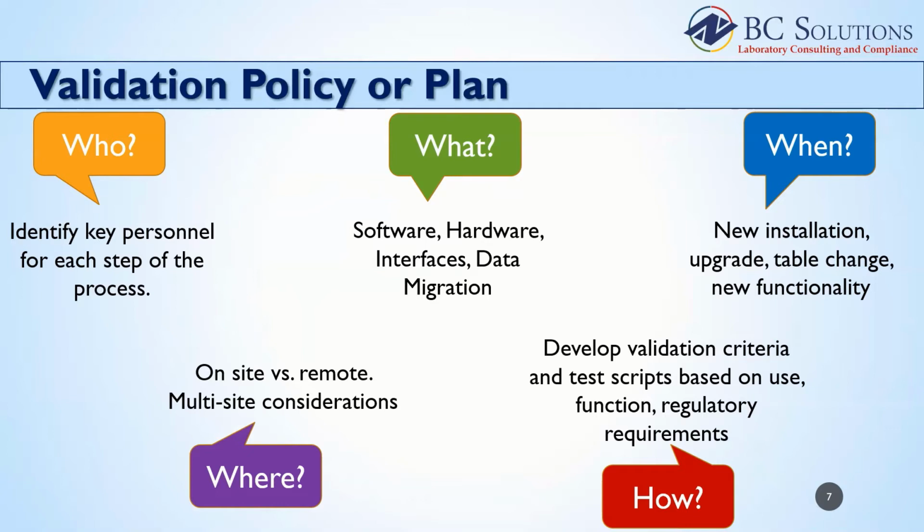You need to decide beforehand when you are going to perform validation. Certainly, a complete validation will be required for new installations and will likely need to be repeated at regular intervals, usually associated with code upgrades and prior to taking new functionality live. Additional validation may also be needed after a change. This can mean configuration changes, patch installations, bug fixes, and procedural changes.